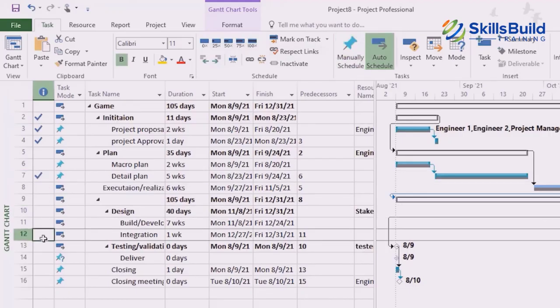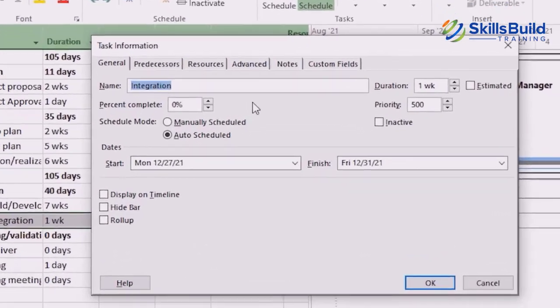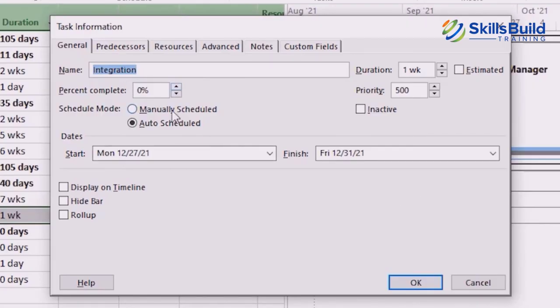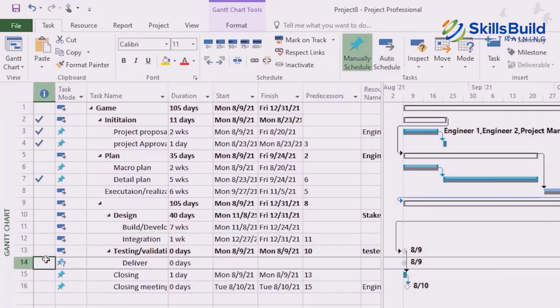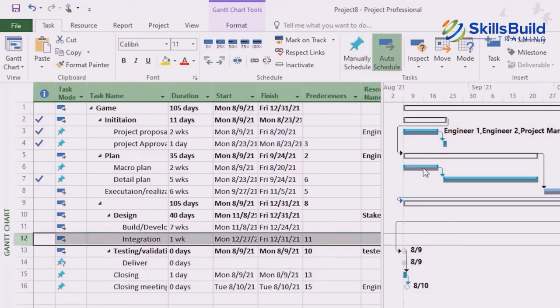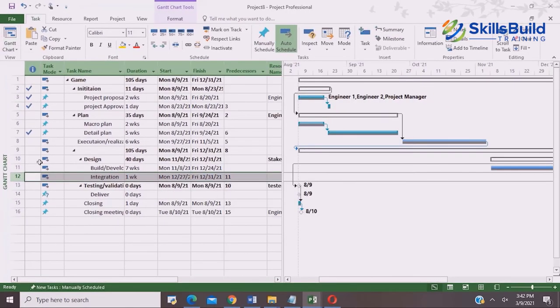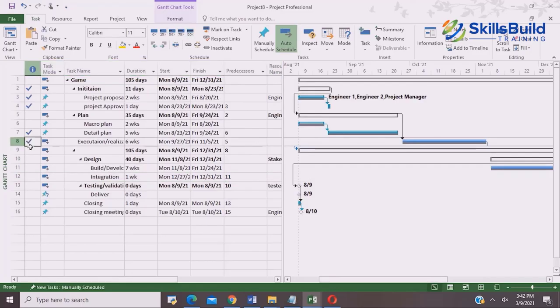Another way to do that is a manual way. For that, double click on any task. You see this window here. Here you see the option percentage complete. From here, you can click on any of the things, and you can make it move up and make it move down. So now we are on the 50%. Once you set the percentage after increasing, decreasing, you can click okay, and you are all done. While we were completing the tracking, all the tasks that are completed, they are ticked.